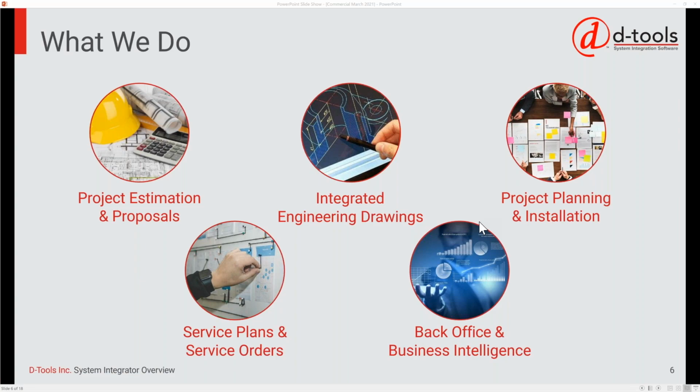That's really powerful because you have all the estimated information on what you budgeted the cost to be on the products and on the labor. Then as you receive the items in the warehouse, and as the information comes back from the mobile apps from the techs in the field, you can see percentage complete, what the delta was on what we thought the cost would be on labor or products, and do some really good job cost reporting in our software.